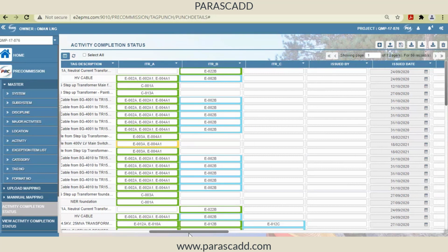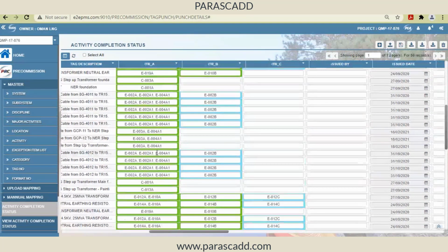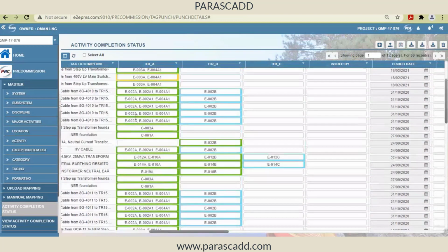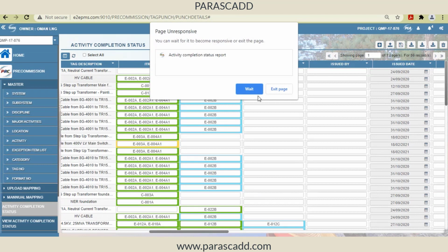Now for progressing, since I have to complete a particular tag, I have to complete the AITR. So I can download AITRs here. For example, this one is in green. I'll go for a particular case and click here. You can download the template from the system, and the downloaded template will have this information built in, meaning it will have the system number, subsystem number, project number, everything.